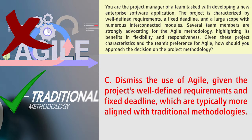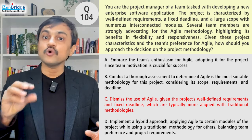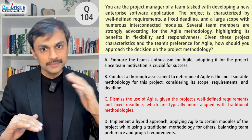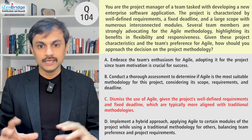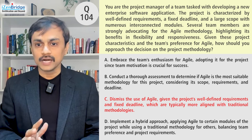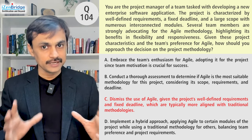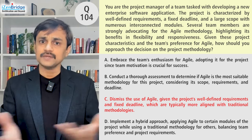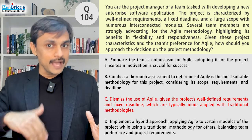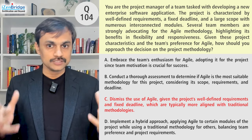Option C: Dismiss the use of Agile given the project's well-defined requirements and fixed deadline, which are typically more aligned with traditional methodology. However, team preference is also a factor, and in Option B I'm not saying I will or won't use Agile. There are elements clearly showing it could be a predictive lifecycle, but there's also team enthusiasm attached. Dismissing the team's recommendation directly may not be a good idea. I should conduct the assessment first, because the other parameters also need to be considered — acknowledge, analyze, then act.